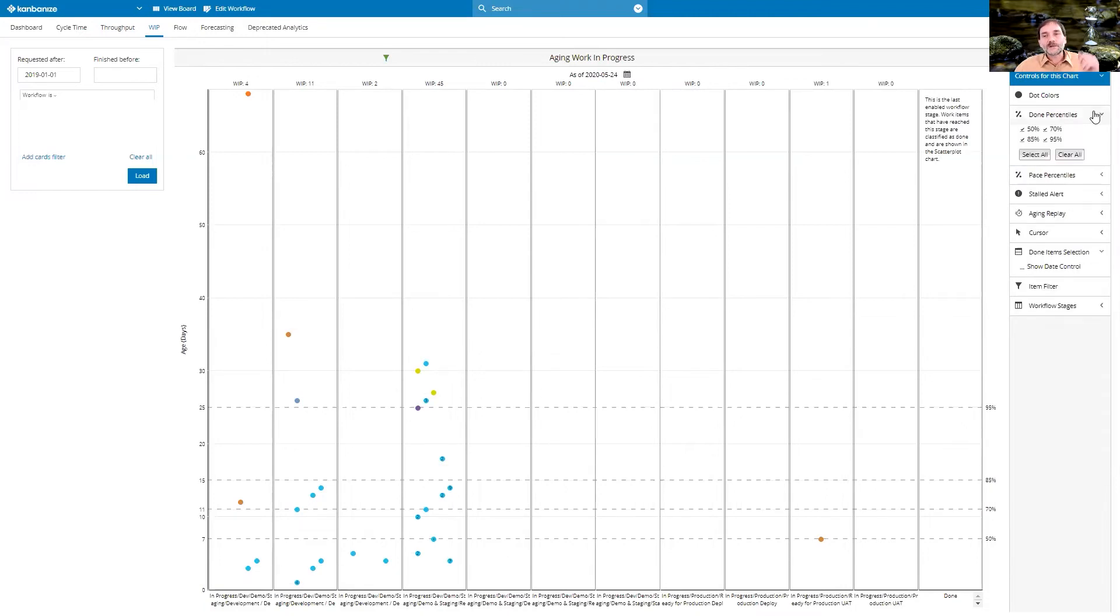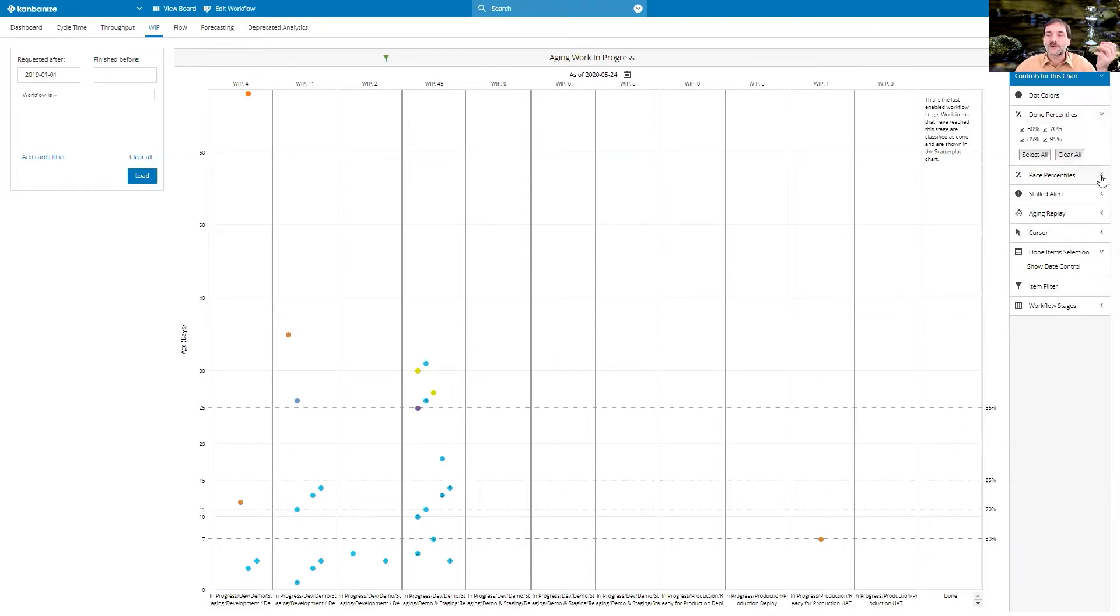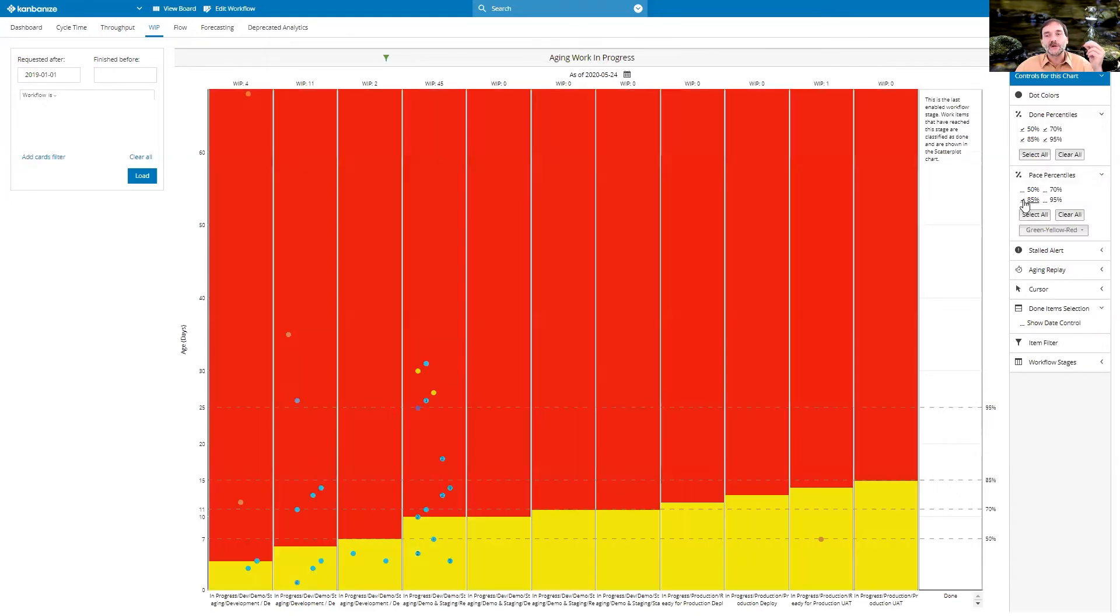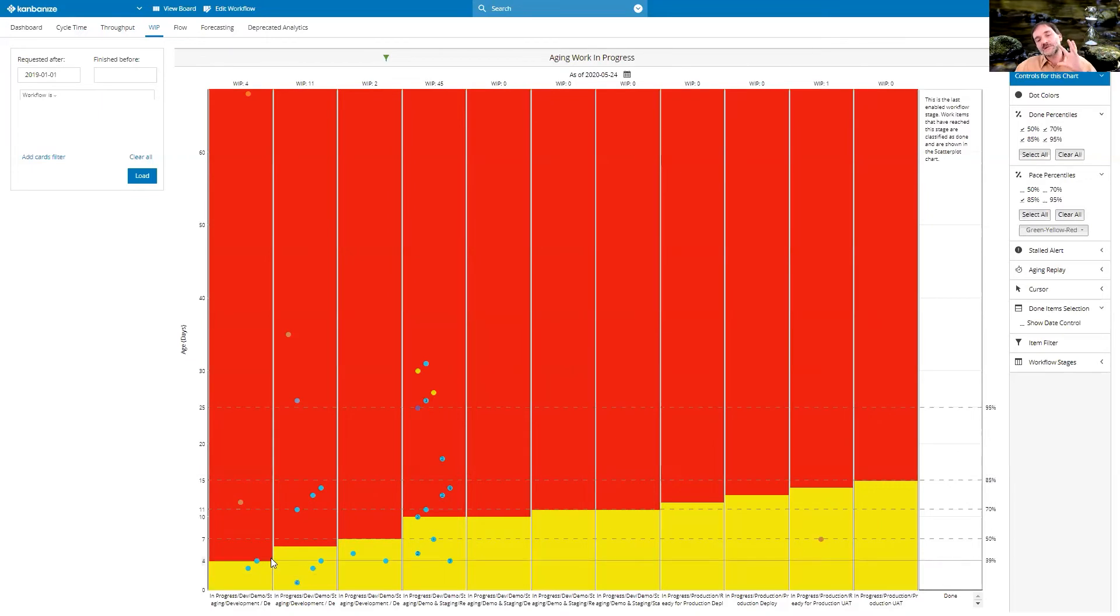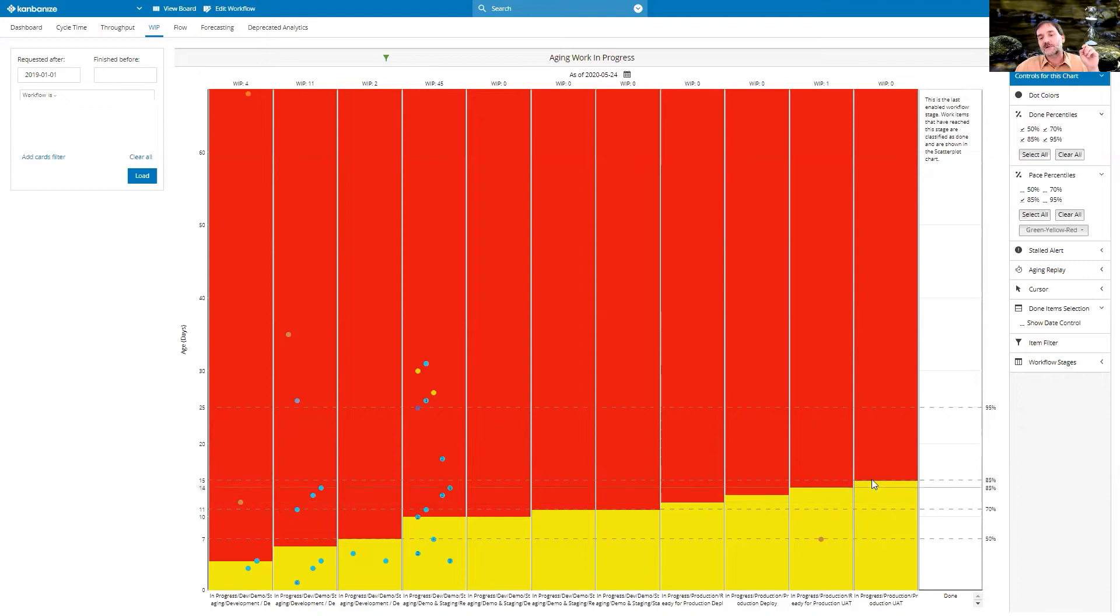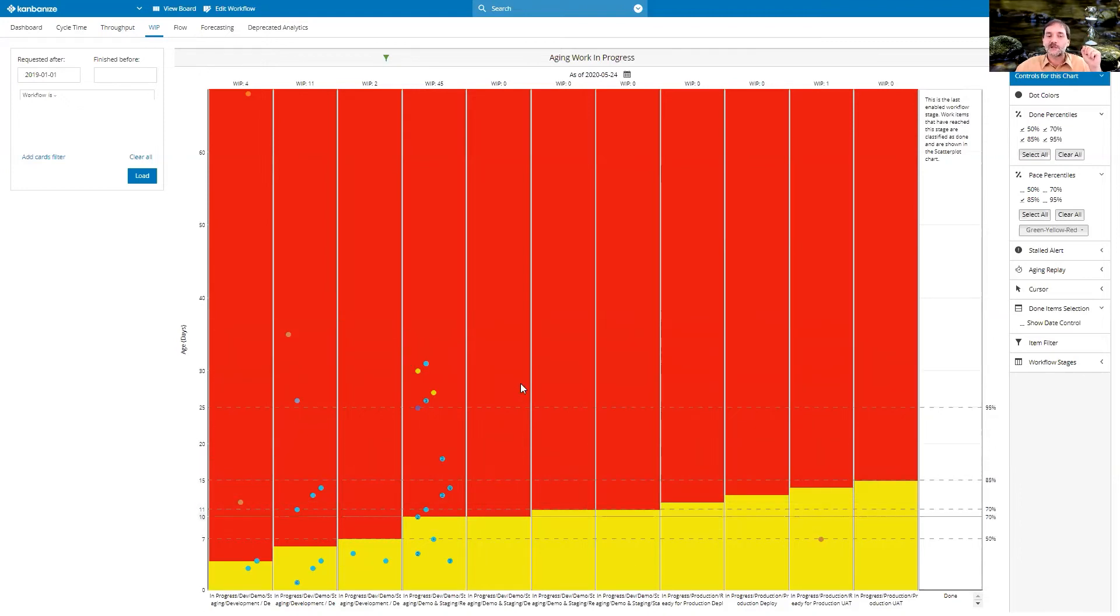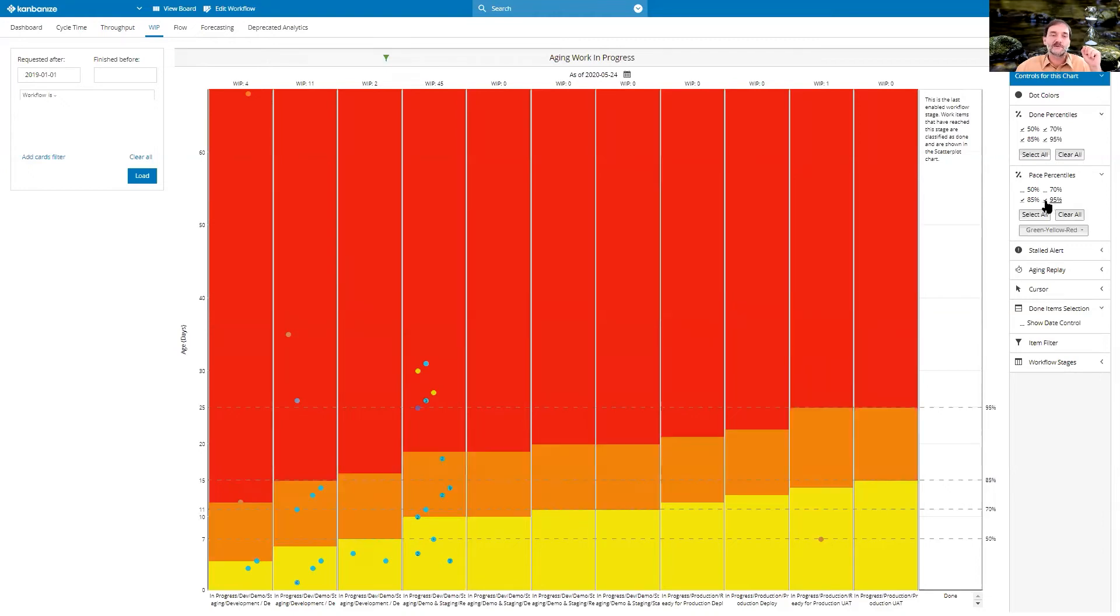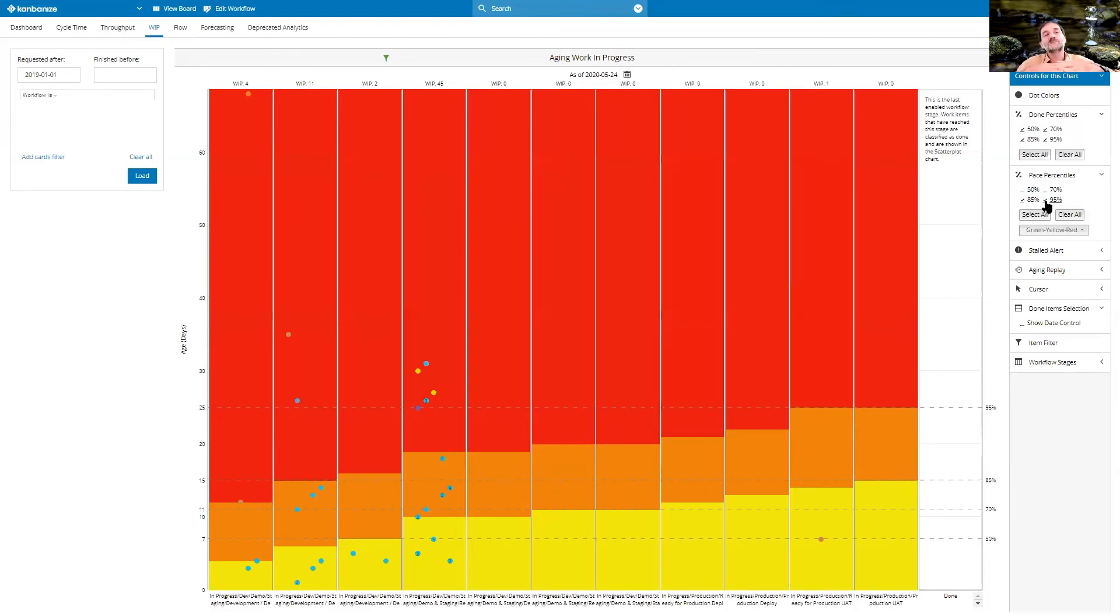Another thing, I already switched on the done percentiles, but there's an interesting one we could put on the past percentiles, which means that in your historic data, this is where the 85th percentile sat in each of the columns. And now we can clearly see that there is something happening here, because a lot of them are above the 85th and even the 95th percentile, which means we are bringing these percentiles up day by day as well.